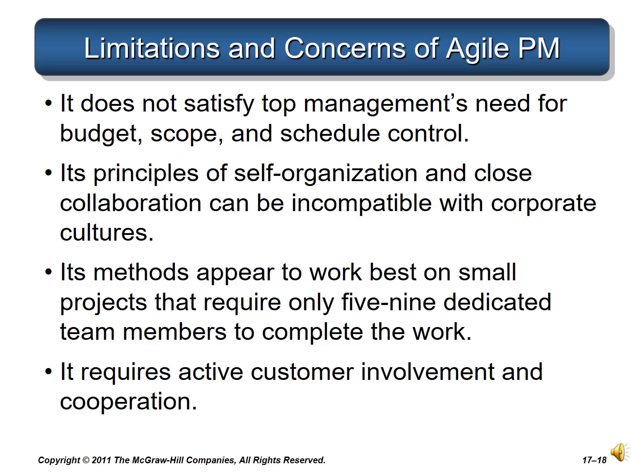Agile project management frameworks, like Scrum, are used exclusively by some companies to complete software development projects from beginning to end. Other companies are using agile project management only during the early exploratory phase of a project. Agile project management is used to develop critical breakthroughs, technology, or define essential features. Once the feature and the technology are known, then traditional project management is applied to complete that project.